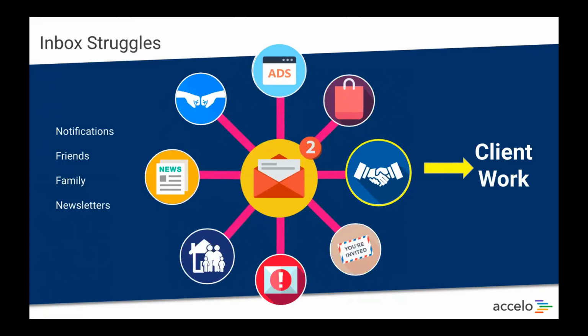One of the largest issues that can happen here when our inboxes aren't aggregated into some sort of pool or general inbox is that somebody may have to be out of office. It might be unexpectedly, or it might be for a long term. Somebody gets sick, or somebody's out on vacation for a long time. And if a piece of the puzzle for our project to move forward is living within that individual's inbox, we may have to put the project on pause or on hold until we can get a hold of that information.